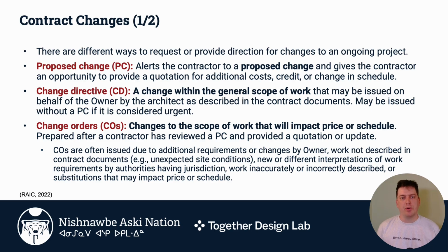The first is a proposed change, and that's led by the owner. And they give the contractor the opportunity to give a quote for what the cost and time of this change is going to be. So this is when you, as the owner, identify something you'd like to see done differently in your project. You initiate the change, and the contractor is then able to respond to that initiation before it gets codified.